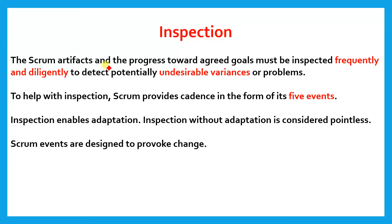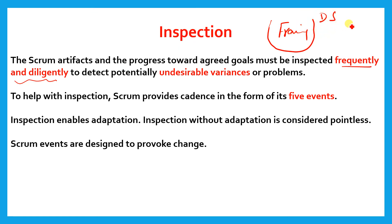The second pillar is inspection. The Scrum artifacts and the progress toward agreed goals must be inspected frequently and diligently. Whatever we do in a sprint we have to check — that is why we do Daily Scrum. In the Daily Scrum we check whether we are proceeding toward our Sprint Goal. The Product Goal we check once a week or once a month, but the Sprint Goal we check daily. We do this to detect potentially undesirable variances or problems, and the Scrum team must resolve them as soon as possible to avoid further deviation.